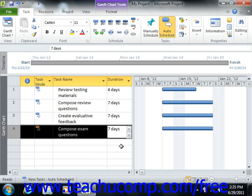For example, using a standard work schedule for a task that starts on a Monday and has 5D as the duration, that task will finish on the following Friday of the same week.